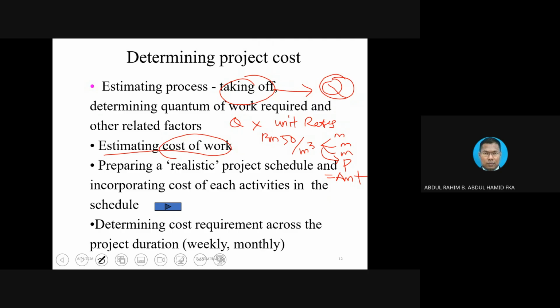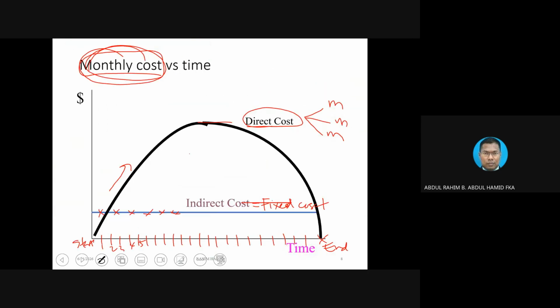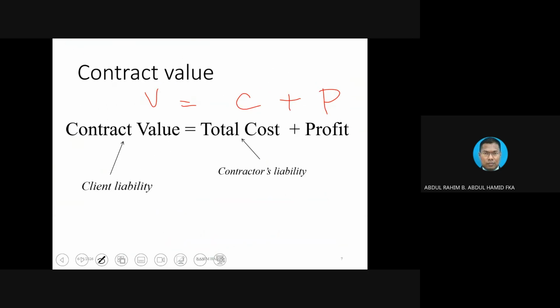That then becomes the total value of the project. And you notice that profit here, in the unit rate, profit is embedded there. At the beginning, I already mentioned profit. Normally, the contractor will calculate total costs, all in all, and then mark up. So that's why profit is sometimes better known as markup, the contractor's markup.